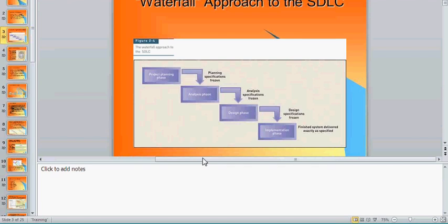If you don't do that, then the other option is to scrap the project and start afresh, which is an even worse option. Why? Because let's say you were in the analysis phase or the design phase and you realize that this is not what you want to build, that this is not going to help meet the objective. You scrap the project, you have used up 50% of the money, and do you have something to account for it? Anything tangible? Do you even have a product to account for the money that you spent? No.